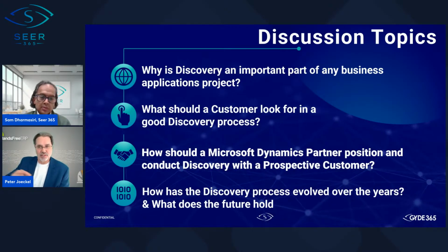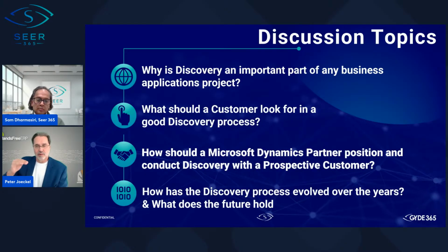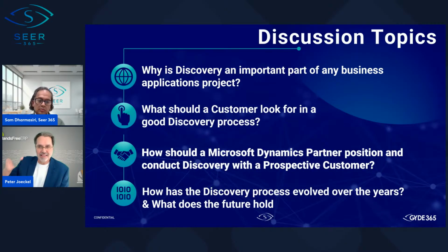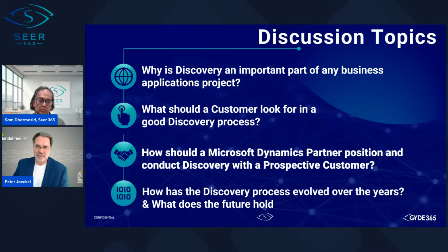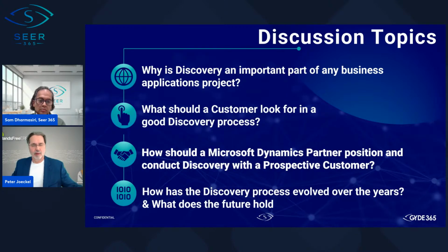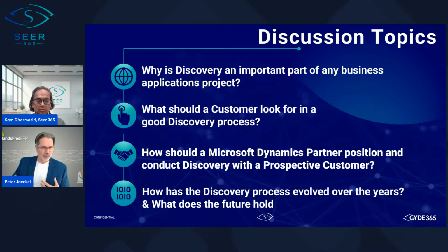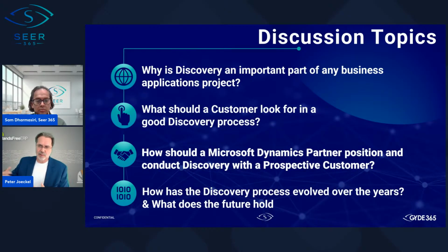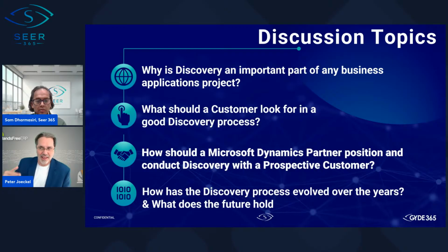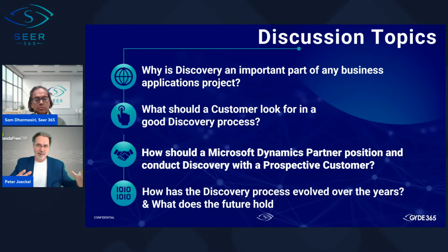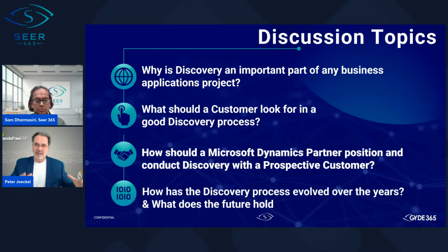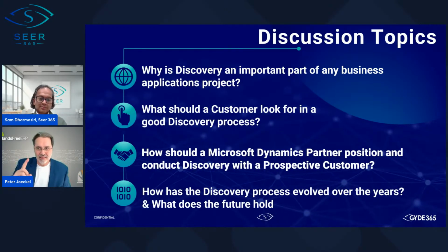Let's make believe that we're starting with a blank screen and we're saying, here are the things ideally we want to be able to do in the system moving forward. And that's where we develop that list: here are the absolutely critical requirements, here are the things that we should have, and here are the future state items that we'd like to create. What that does is it totally misses that huge front step where people are documenting the mess that they currently have. And this is worse.